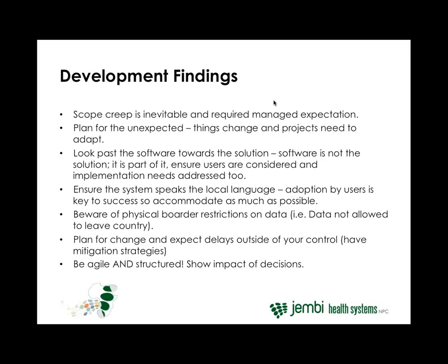Often a quick change in software that may take a week now seems like a good idea, but unless you can trace that through until the end of the project and actually show that a week spent now is not a week for the current tasks being done, it's a week at the end of the project where certain things will not be done. So while being agile is a valuable approach to implementing health systems that are so broad and diverse, it's important to have a structure and be able to show the impact that these decisions have as you move along.